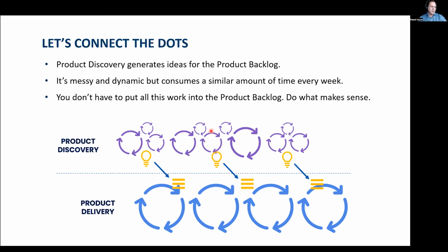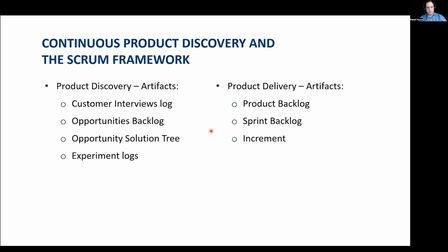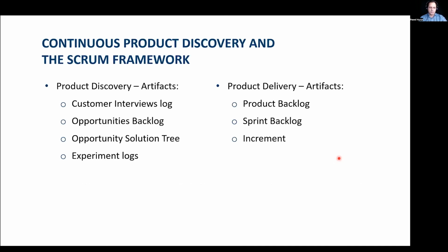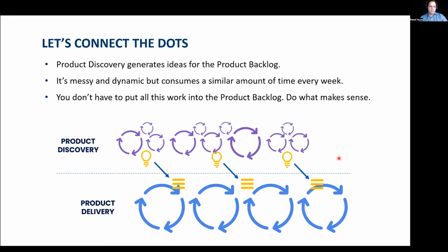Some of them may be validated, although I do not fully agree with this quote from Marty Kagan that product discovery results in a validated product backlog, because some ideas which are not risky can be directly implemented, and this is also supported by Teresa Torres. So we just take some low risk ideas and we can ship them and then learn after delivering.